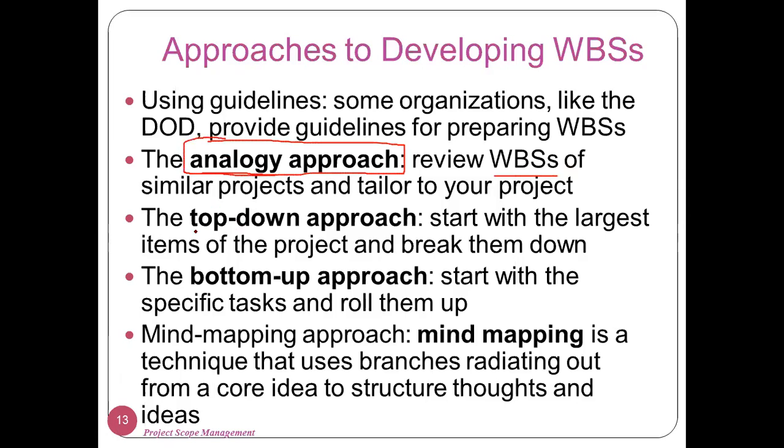The top-down approach is the basic approach which we used to do, that is a hierarchy or divide-and-conquer strategy, in which you have a main module, and then this main module is further decomposed into sub-modules. So this is your top-down approach.